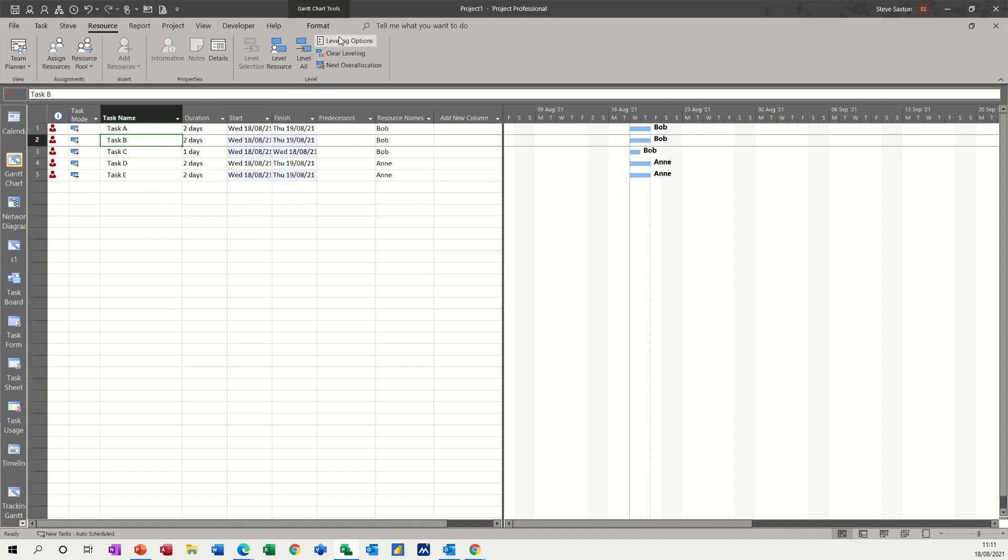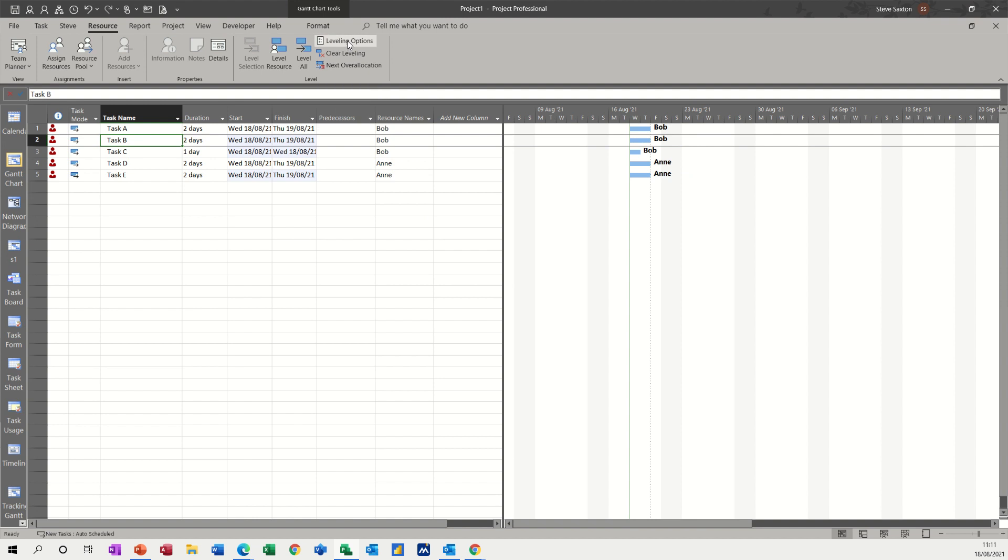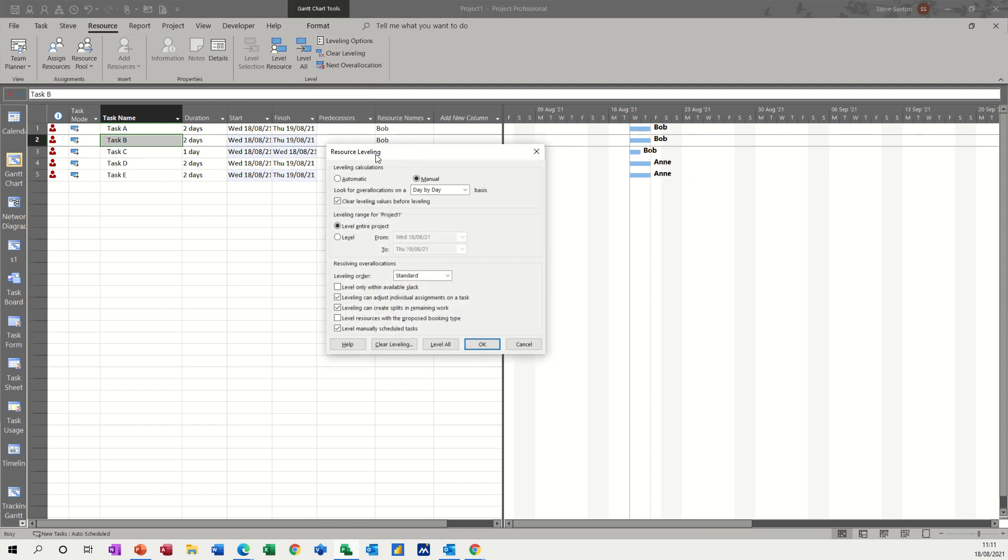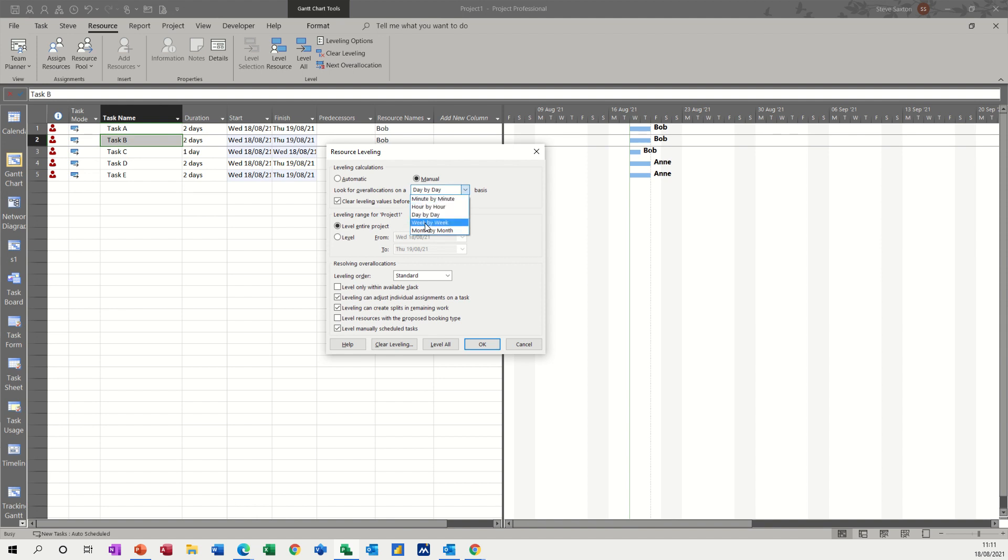Now what is causing this? In leveling options, you've got a few features that are quite useful to know about. So at the moment, by default, this is set to manual and day by day. That's just how tight this is doing it by a day, but you can change that to be even tighter minute by minute or slacker week by week, month by month gives you a bit more slack, but that's a default.